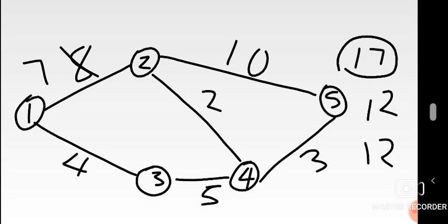So you go back, the same picture. The critical path is 1 to 2, 2 to 5. You're about to start crashing. Apparently it's the same network. When you're starting to crash, which one do you start by crashing? The activity having the least cost per day. And since it's the same one, we get back to activity 1 to 2. So we've already crashed it by 1, and it should end on 6, because the crash limit is 2. So reduce it further. You're now on 6. Okay. Redetermine the critical path.